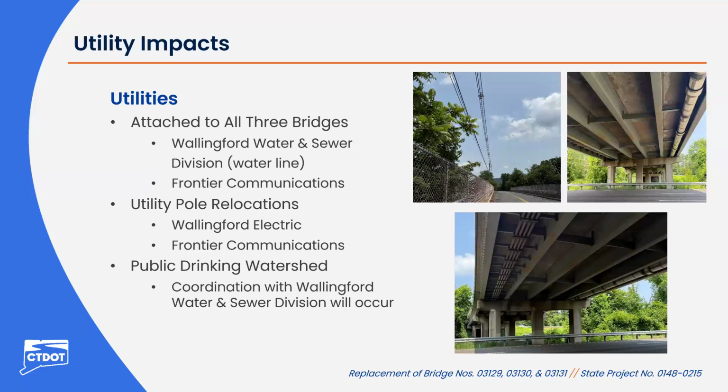There's likely going to be utility pole relocations for the sidewalks. We are working with Wallingford Electric and Frontier Communications, who are the owners of these poles, as well as the service providers that are on those poles. We are aware that this is a public drinking watershed, and we are coordinating with the town of Wallingford and the Wallingford Water and Sewer Division.